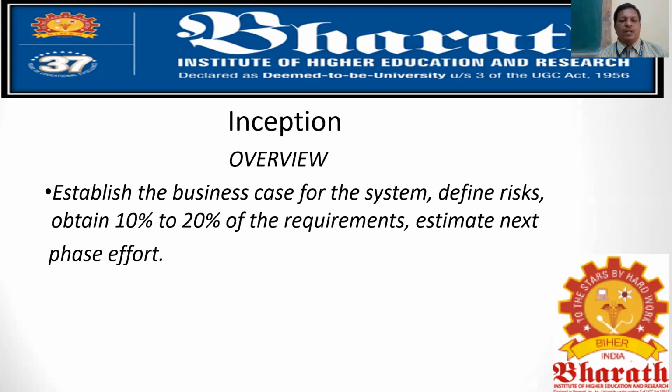Now let's focus on what inception is. In general, it provides the establishment of the business case. The business case is the problem for the system, that is, for any application. So we are going to establish the business case, that is the problem, and then we define the risk. It obtains only 10 to 20% of the requirements, and also it estimates the next phase effort. The next phase effort is the elaboration phase or evolutionary requirements.